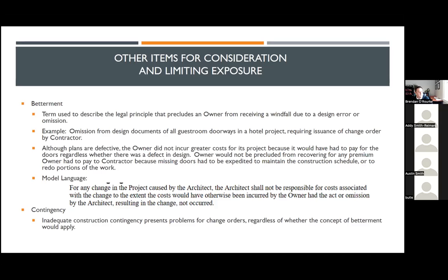And if there's a contingency in place that you can eat from, then it certainly helps a smoother project. Problems arise when the contingency is being spent on unnecessary owner upgrades, or is non-existent altogether. And when there's no additional funding for a public safety building or a high school, the owner is going to be looking to the design professional to pay for these added costs.